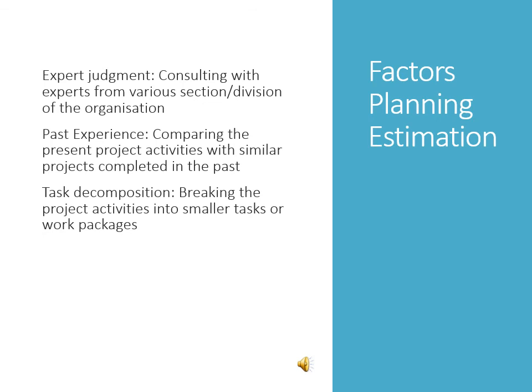Planning estimation is to be based on expert judgment, consulting with experts from various sections and divisions of the organization, and past experience, comparing the present project activities with similar projects completed in the past. It also uses task decomposition, breaking the project activities into smaller tasks or work packages.